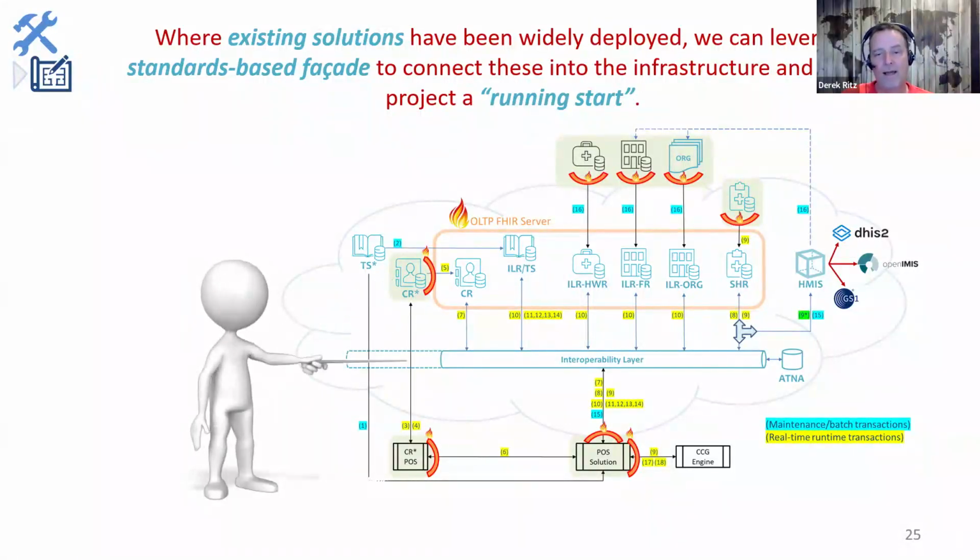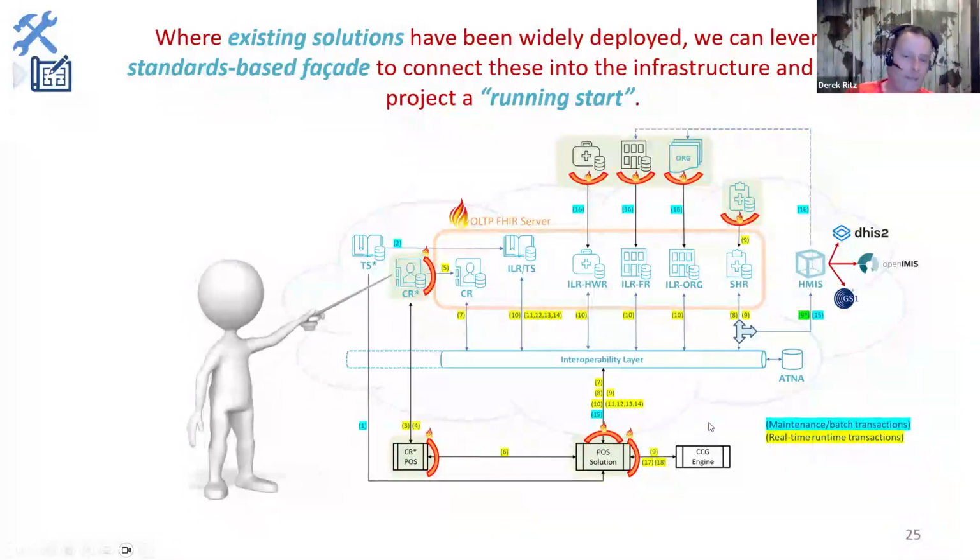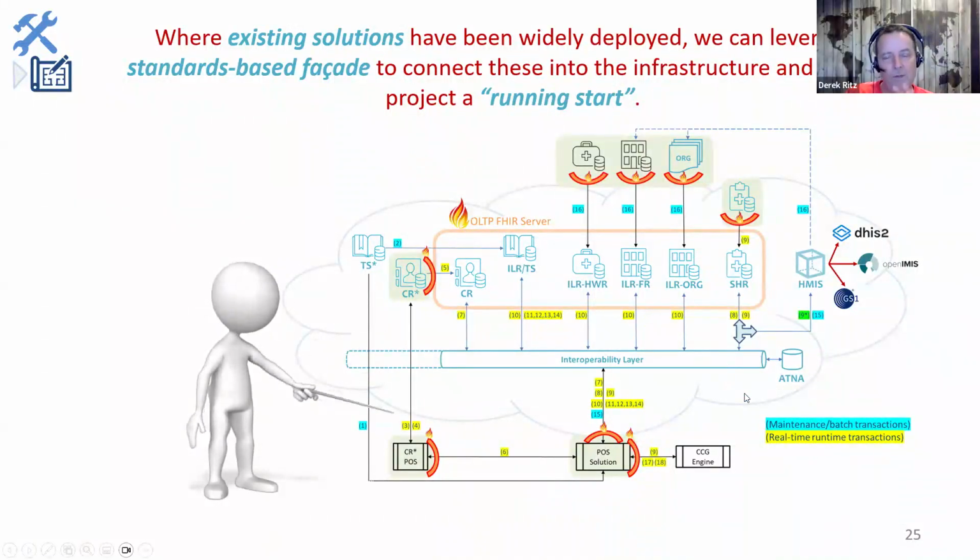And you just tally all of that up and say, well, it'll cost about this much per facade, and this much for a little facility, and this much for a medium-sized one, and this one for a big one, and so on and so on. And you do activity-based budgeting, saying what's the quanta of how much stuff I have to do and how much is each going to cost.